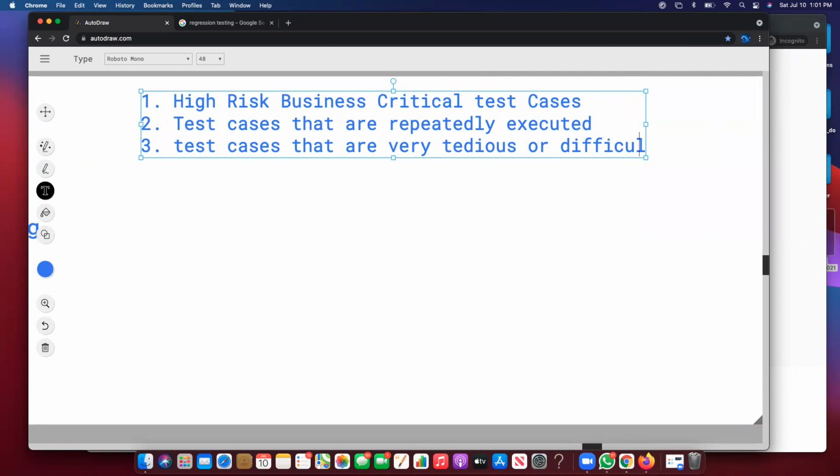So if in your team you are the owner, you're taking ownership, then yes, your voice will be the loudest, right? You're going to say, listen, I cannot go with the release tomorrow because we don't have enough time. I have 100 test cases left to be tested, and it will take the entire day tomorrow, so we can release the day after.